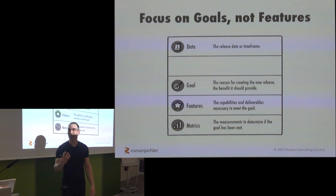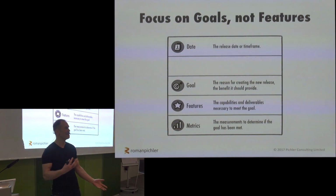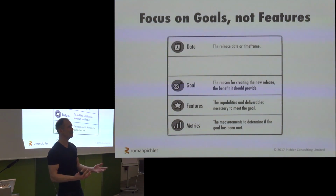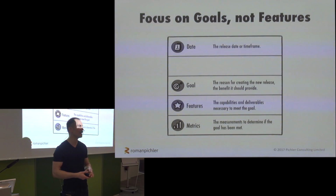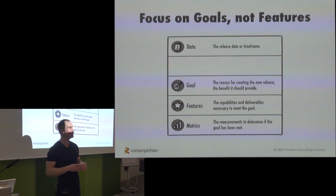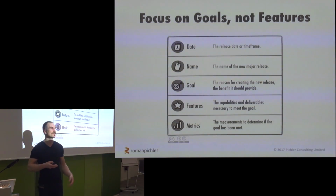However, if you work with an external roadmap, that's used to a certain extent as a sales tool to instill confidence in the marketplace, that you've got some great plans, and there'll be some amazing benefits and some cool features that you're going to offer to your customers in the near future, then you may want to avoid dates, and you want to use some loose time frames, something like now, or the second half of this year, next year. So you still use some time frames, but that'd be very vague. And then the last row is very boring, I'm afraid to say. It's just simply an identifier, so you can give your releases a decent name.